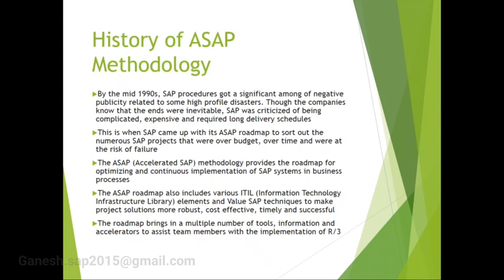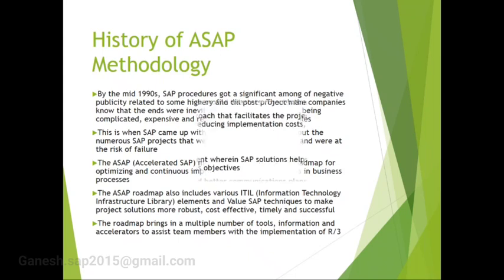In SAP methodology, the steps ensure you have proper discussions with the business to understand the business requirements, and to have a legal agreement between the customer and the vendor, that is, between the client and the IT partner. That is the business blueprint. Based on that, we proceed further to do the config setup, and we do the agreed developments, and then we have to give proper training to the users. First we give proper training to the core team members, and then the core team members give the training to the end users before go live.